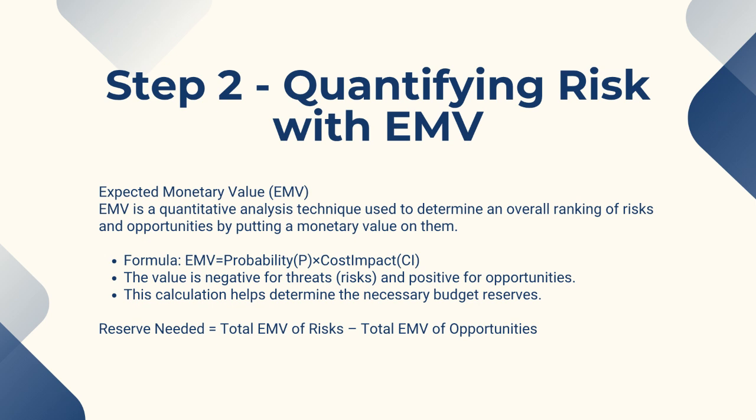Another way to assess risk is to quantify it, and the best tool for this is expected monetary value, or EMV. EMV helps us put a dollar value on our risks, which allows for an objective ranking. The formula is straightforward. EMV equals the probability of the risk occurring multiplied by its cost impact.